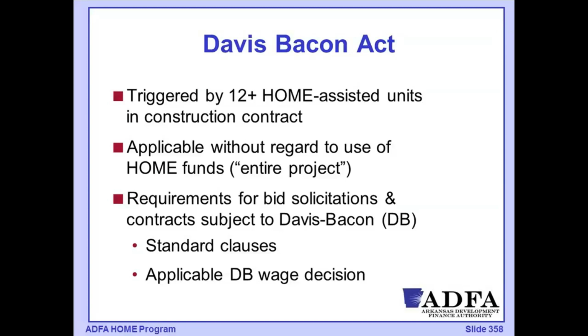Because it is not hitting the 12 or more HOME-assisted units designation, that project would be exempt from the Davis-Bacon requirements. It's 12 or more units under HOME.